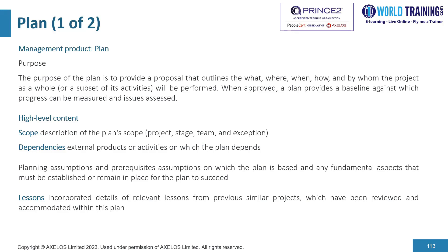The plan contains a scope section providing a description of the plan scope. It also includes dependencies — external products or activities on which the plan depends. Planning assumptions and prerequisites are another key component: assumptions on which the plan is based and any fundamental aspects that must be established or remain in place for the plan to succeed. The plan also includes lessons, incorporating details of relevant lessons from similar projects in the past which have been reviewed and accommodated.